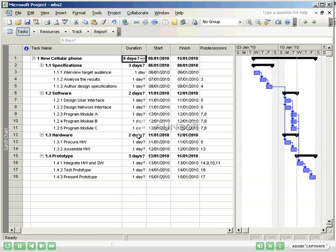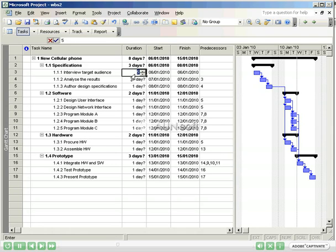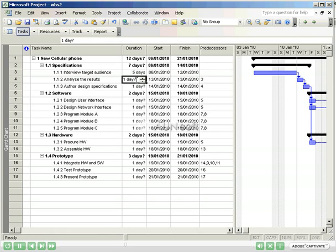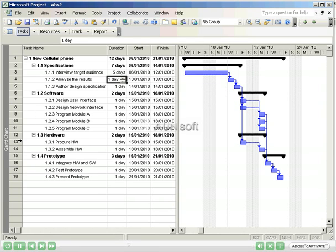Confusion and misinterpretation can result from entering some tasks in hours and others in days. I will enter a duration of five days into interview target audience. Notice that it has moved the start of analyzed results out by five days and moved all other tasks accordingly. This is because we had previously entered interview target audience as a predecessor to analyzed results.